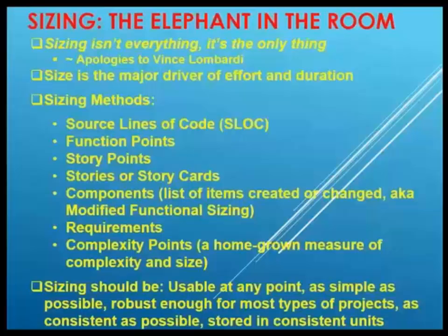You have to do that kind of analysis to say what kind of gearing factor you should apply to get to the implementation units to make all the data consistent and line up. And we've been real consistent with that afterwards. Now we're getting to a point with some of the smaller and some of the iterative projects like Scrum and Agile that we're starting to think about applying some different factors. But again, we recently did some further analysis on those, and we're actually still good with those same gearing factors.